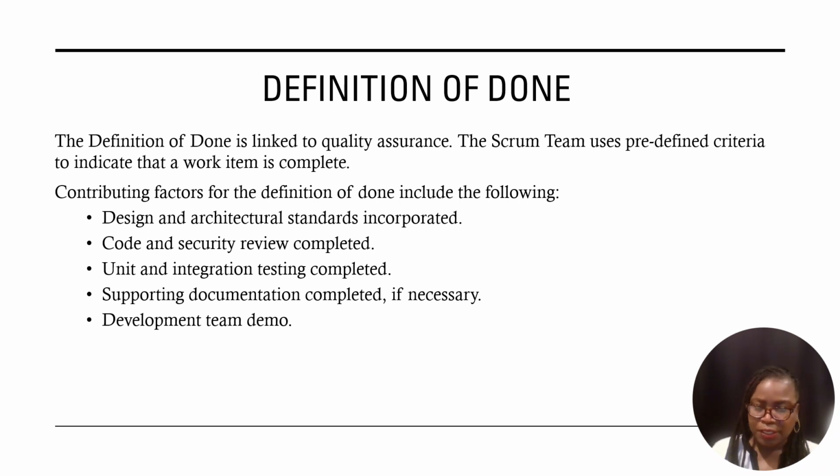Your design doc is still due, and the work items won't be considered complete until that design doc is completed and archived or passed on to whatever group requires that as a part of the work being considered done. Also, code and security reviews may be required, and if your team has not performed a code review and really a security review, then the organization won't consider your work done.